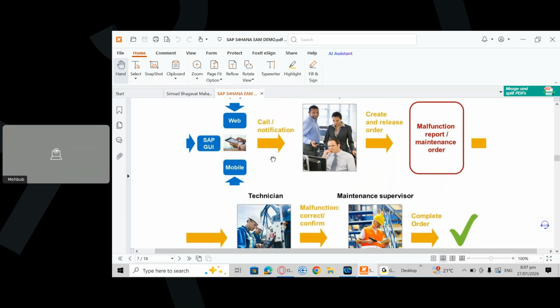You only need to activate the business function and then you can go ahead and do the planning for the phase. So instead of controlling based on the user status, you can control through the standard phases that you define in SPRO, right? Yes, there are some phase points you can define.